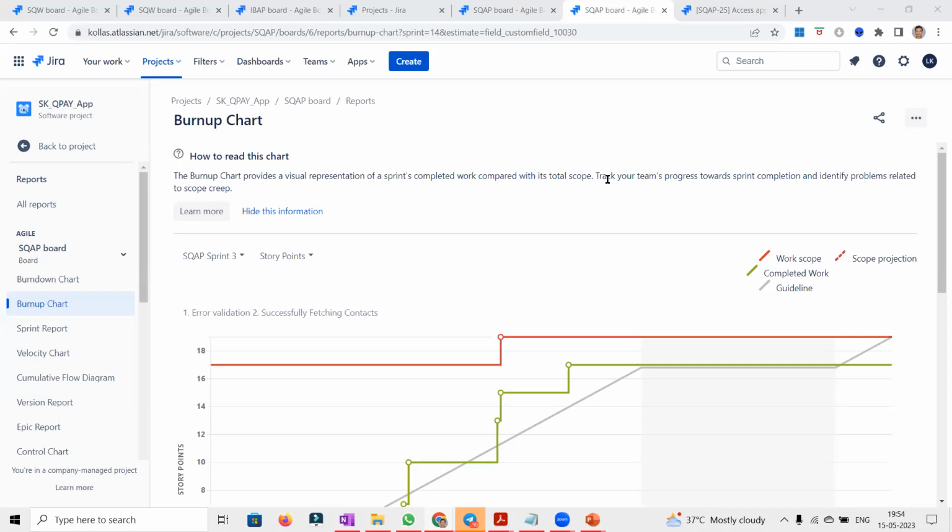That's it. If we keep on changing the original estimates, the team will start coming back saying, okay, Amol and Satish are letting me change at any point of time. So during backlog refinement, or whenever they are creating the tasks or doing the original estimates, they'll think, anyways, I can change it anytime. I will give some random numbers. It will become a habit to the team.